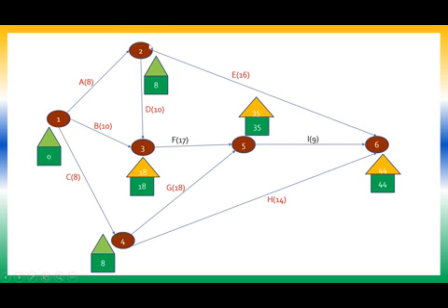Here I have two nodes coming in. So one will be decided based on this 44, the other one will be decided based on this 18. So 44 minus 16 is one value, 18 minus 10 is another value, and the minimum of both has to be written. So minimum is 8. Similarly here, the value will be decided as 35 minus 18, which is 17, or 44 minus 14, which will be 30.